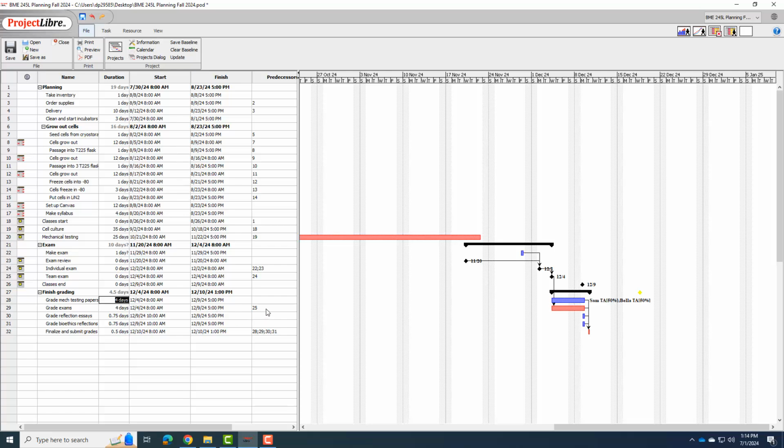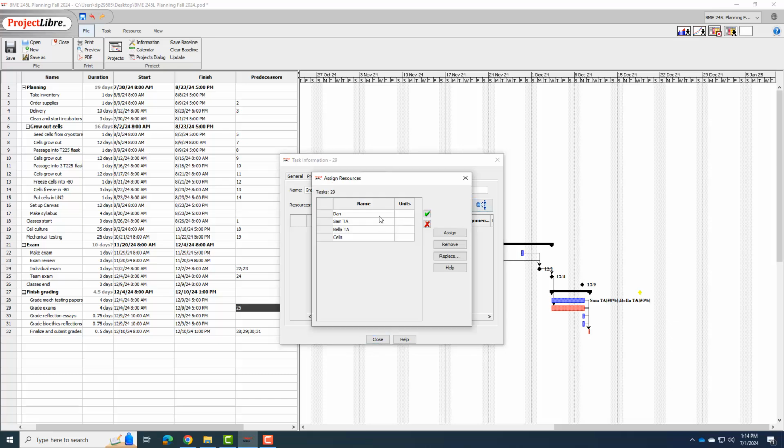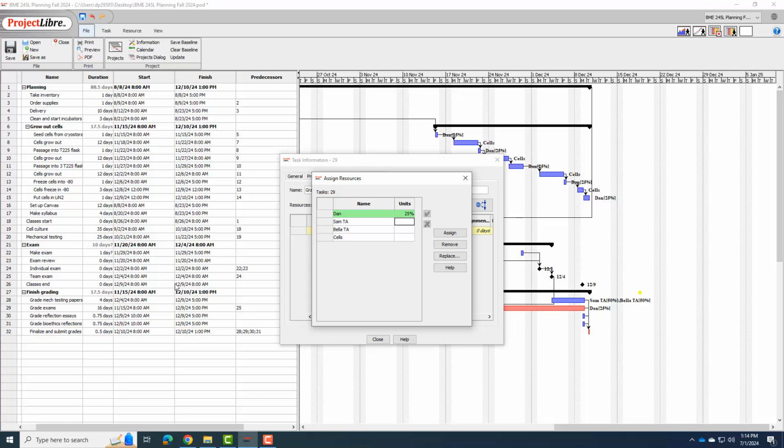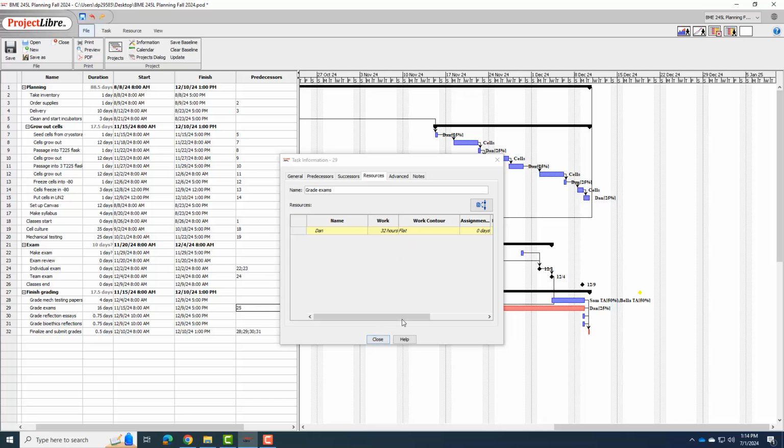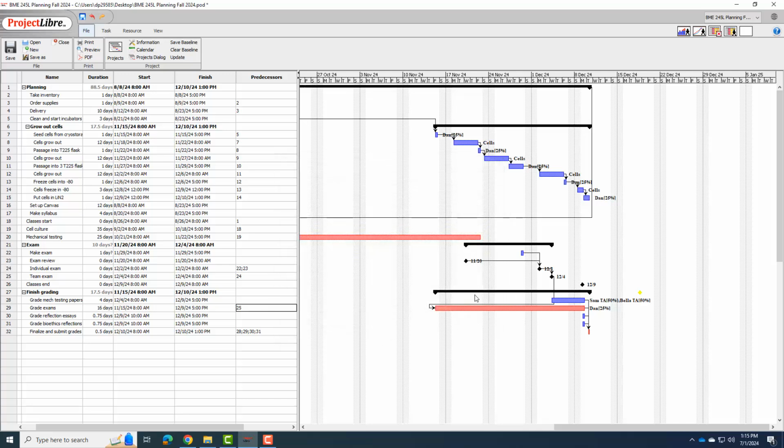Okay, grade exams. I do all the exam grading. So I'm going to change this to be me at 25%. All of a sudden, all the cell stuff showed up over here. I'm not sure why, but we're going to get that fixed. We did say the exams would probably take me a total of 32 hours of grading, so that's in there. I'm going to close this, and you can see things don't work now as we needed.